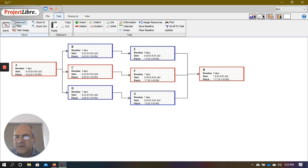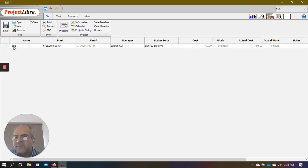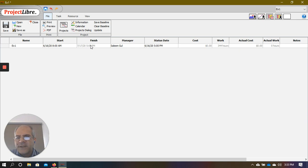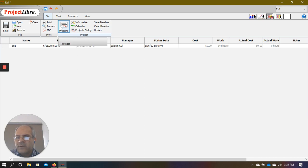I can click on Projects to see additional information: the project name EX1, the start date, the finish date calculated as July 17th, the manager name, status date, cost, and number of work hours. We'll ignore most of that for now and go back to the Gantt chart.